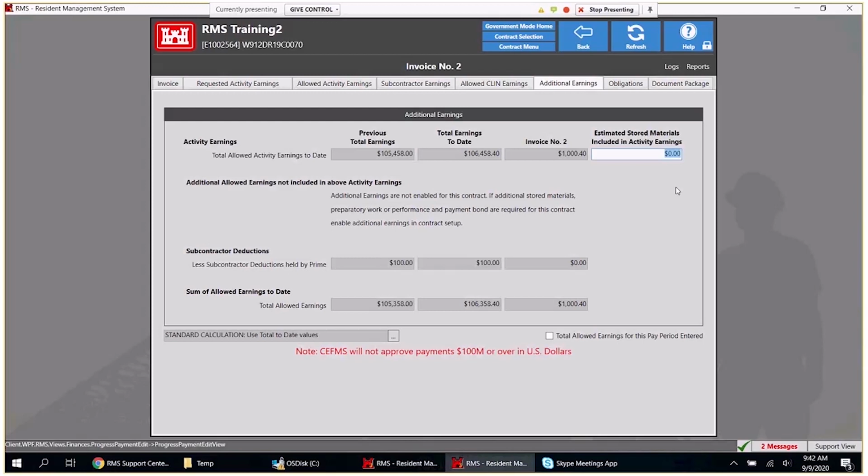Okay, well, they've got $300,000 worth of red iron sitting out on the site. You're going to go inspect it. They're required to inventory it. And you can go ahead and pay them the $300,000 up front, but then you have to track, and this goes way further into the business process than we're going to cover here. But if you're going to pay them up front, there's a separate accounting that has to occur as the red iron is actually installed.